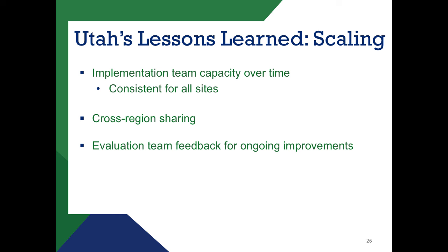And then the last one I would share is to realize how important your evaluation team can be to provide you feedback along the way to help you improve. Someone gave me advice when we were first starting the waiver that we should work closely with our evaluation team throughout the whole process, see them as a member of the team in effect, be able to ask for their input along the way, and be willing to make adjustments. So, for example, feedback from our evaluators early on in some of the early trainings in the first region led us to make improvements in the curriculum and presentations in subsequent regions.